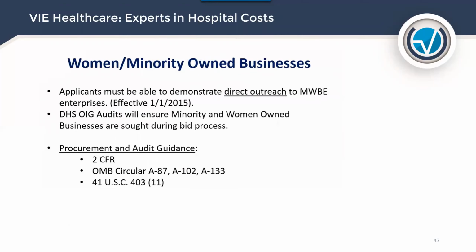So I had this slide. I should have had this slide earlier, but it is interesting. They talk about it on a FEMA website. They have published this, and they talk about it a number of times. Applicants must be able to demonstrate direct outreach to MWBE enterprises. It's been in law for 5 years now. They do audit this, and it's not just posting in a newspaper. It's direct outreach, and you can see it in the procurement documents we'll send to you.